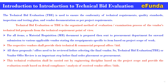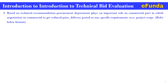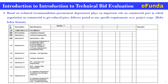This technical evaluation shall be carried out by the Engineering Discipline, based on the project scope, and provides the evaluation result based on detailed compliance analysis of the received vendor offers. The Technical Bid Evaluation will provide a recommendation on a vendor offer, whether offers are technically acceptable or not, and this is how the compilation will be done in the Technical Bid Evaluation. We will see further details in our next slides. Based on the technical recommendation, the Procurement Department plays an important role on the commercial part, in which negotiation on commercial terms is done to get reduced price, delivery period, or any specific requirement with respect to project scope. One can refer to the format where the Technical Bid Evaluation will be done for vendor offers, and the format can be seen that corresponds to all the attachments of the material requisition.